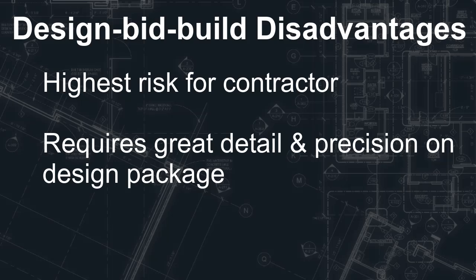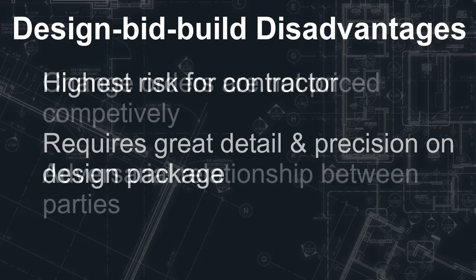So what happens if the cost of lumber or the cost of steel goes up during the project? Well, the contractor has no recourse to recover that cost. They have to plan in their bid that extra cost or potential inflation of cost. So these variables that the contractor doesn't know about in the future, they have to plan for, with a little contingency built in. But it poses a lot of risk to the contractor.